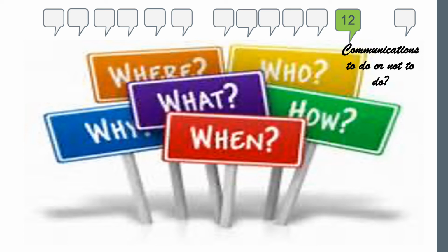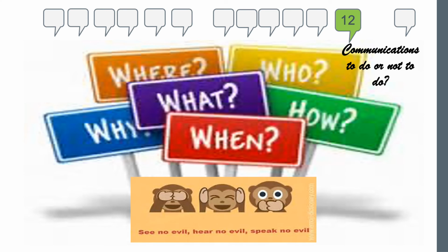So what we've decided to do is we're going to be like the three monkeys. We see no evil, hear no evil, speak no evil. So if there's nothing wrong, our communications will be nil. We will only report on exceptions. Our communications will not just be a blurb of how we are right now. It'll be on exception. So that's how we're going to handle communication, which allows us to focus more on the activities that need to be done.